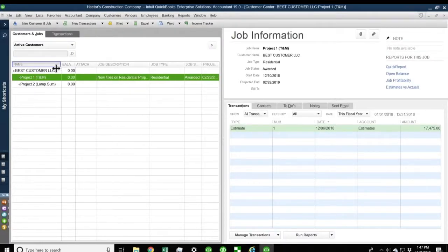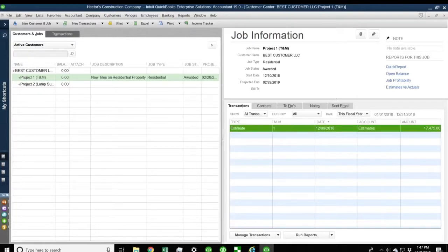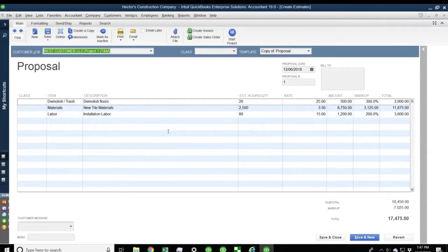Okay, so then the next step is we're going to incur some expenses, and after we incur the expenses, we're going to start invoicing our estimate. So let's say based on our contract, we had 3 invoicing conditions. We said we will invoice 50% of the job upon approval, and as soon as we get the first payment, we'll start doing the job, and then we will invoice, let's say, 40% on completion, and then we'll leave 10% at the end after the job gets approved or the permits get closed, all of that stuff. So we're going to do it like that: 50%, 40%, and then 10%.